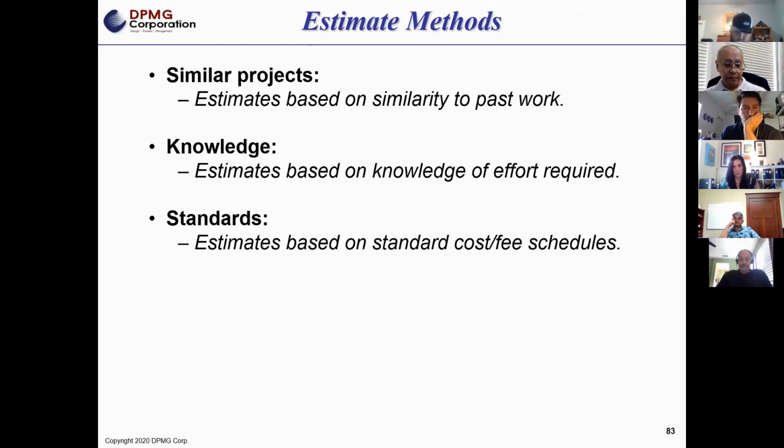Standards. If you have standards, right? Estimates that are based on standards and a fee schedule. A perfect example is anytime you go to a mechanic or to the dealership, let's say you take your car into the dealership, they have a book that has standards for replacing every part of your car, and that's what they use to give you the estimate. Now at the end, it may not be the estimate, but that's what they use. So those are called standards. So you can have standards that have both an hour, time-wise estimate and a fee estimate already pre-calculated.